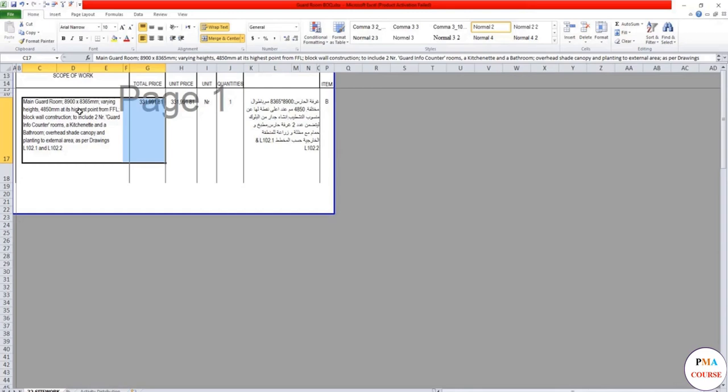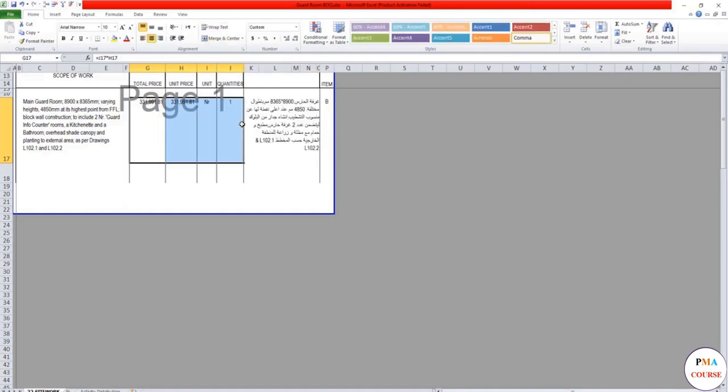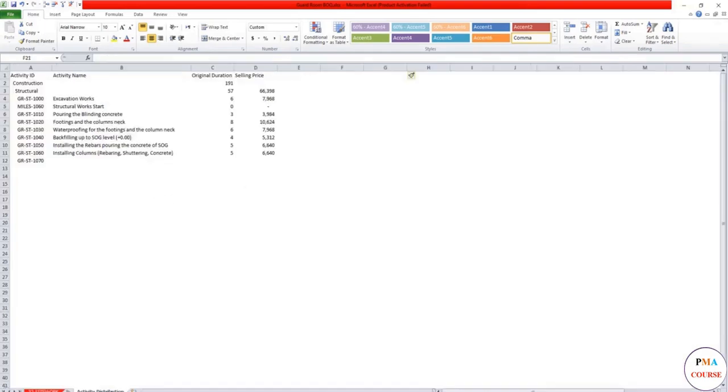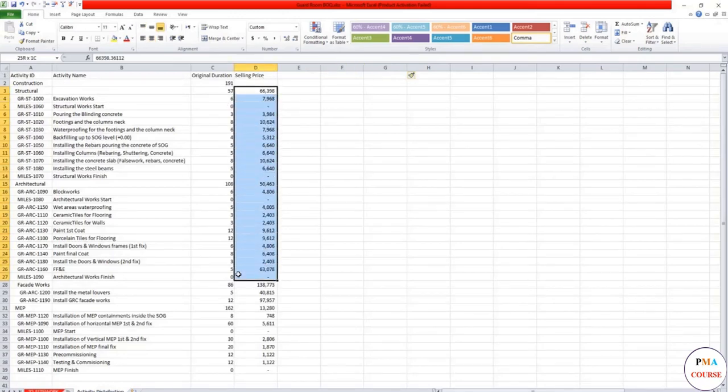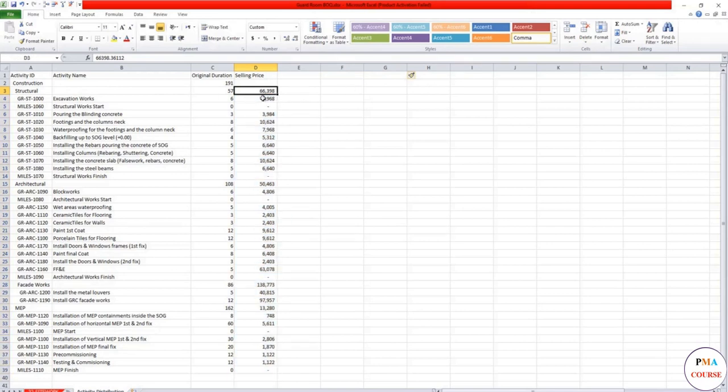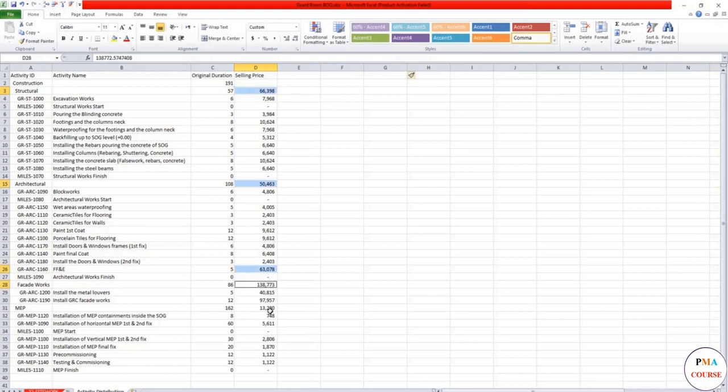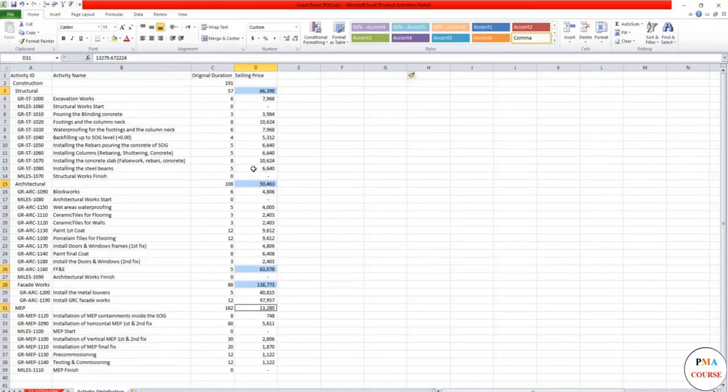In such cases, if it's not clear, you would go to your commercial department, cost control department, or seek help for getting the prices for your activities. When we send the activities to cost control, the selling prices are as following. As you see the selling price, if you add them all, it would give you 331,992, which equals the total.